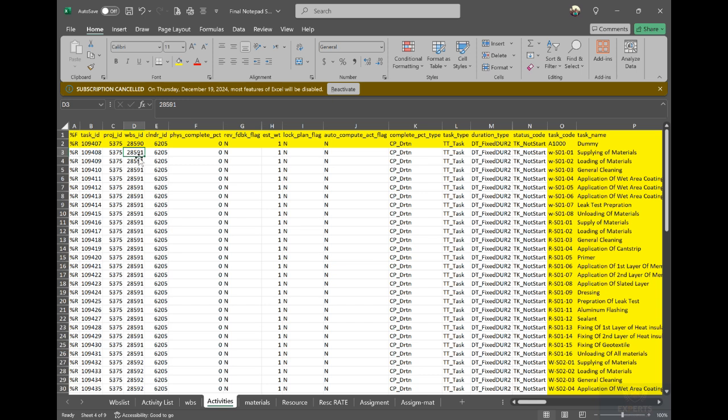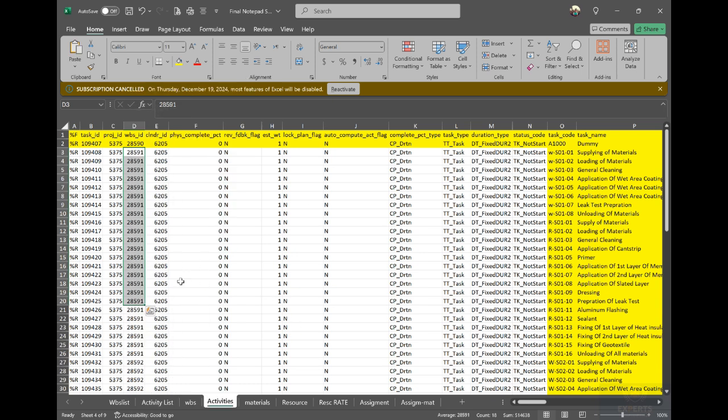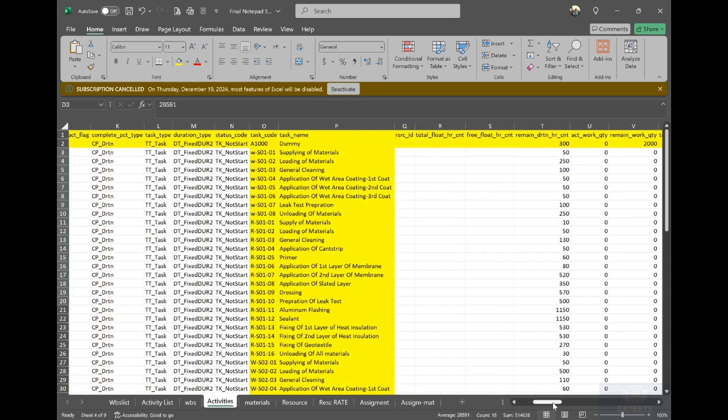And we can start, as we say, with VLOOKUP, building a relation, then searching in the table and putting all the WBS here. After that I will copy the column and paste it again as a number. So it's very important to use the functions for getting this WBS code for each activity. Once we finish the WBS code, all the other items are fine, there is no issue at all.